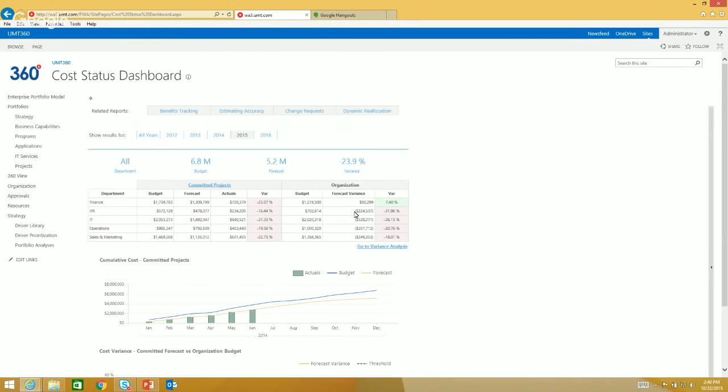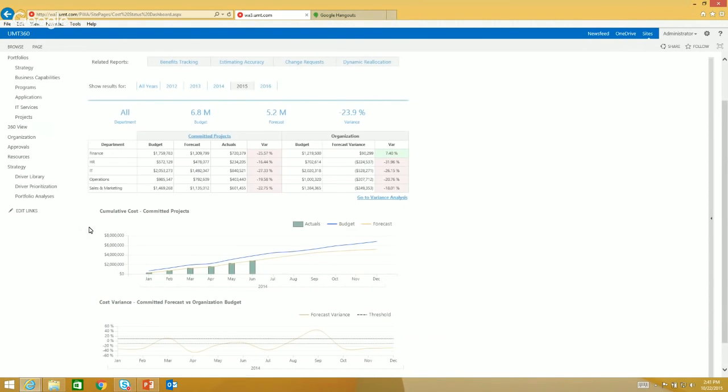Now, it's important because we always want to assess where we are from a top-down budget utilization perspective throughout the year, because we do not want to leave money on the table and, in turn, value on the table by the end of the year. So, of course, being able to drill down here and see cumulative budget, actuals, forecast is important. Here we're simply seeing a utilization problem. Forecast is less than plan at this stage. We may want to drill down to learn more about that.